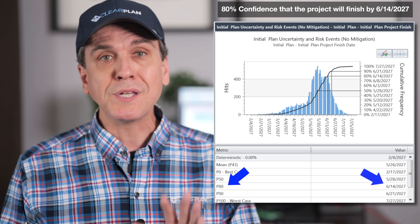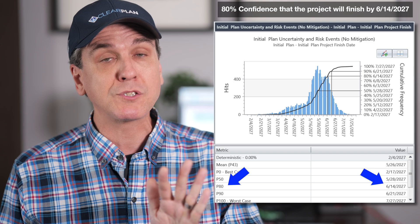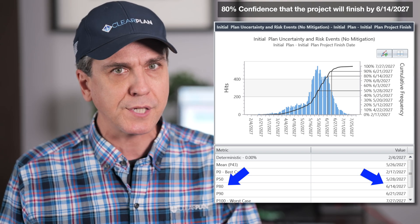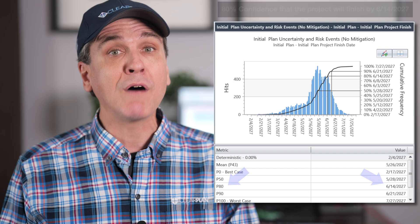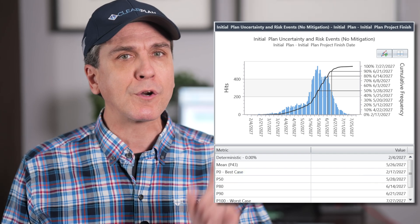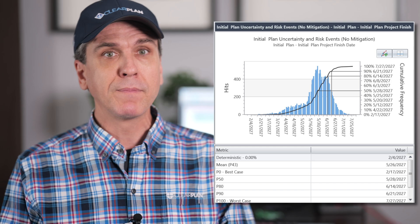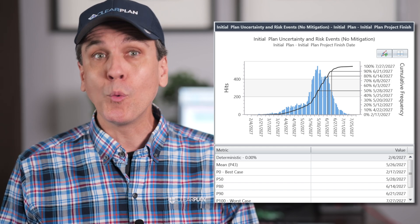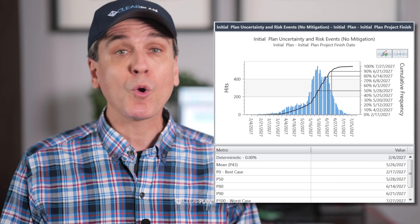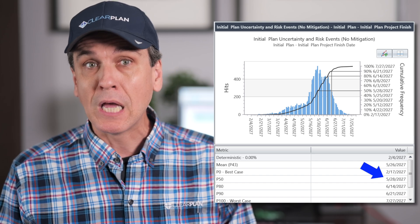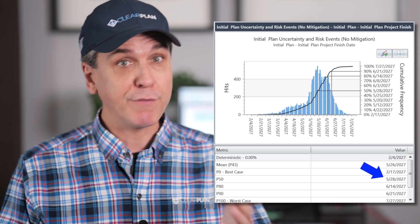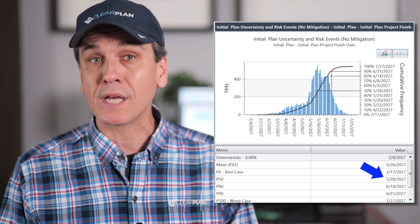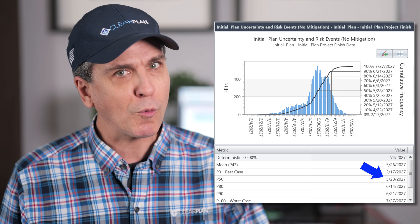This does not mean that the project has an 80% chance of finishing on this date. It means that 80% of the simulation outcomes occurred on or before this date. P80 will always be earlier than P100. And a more aggressive target like P50 will be earlier than the P80 date. P50 is the date that 50% of simulation outcomes finished on or before.